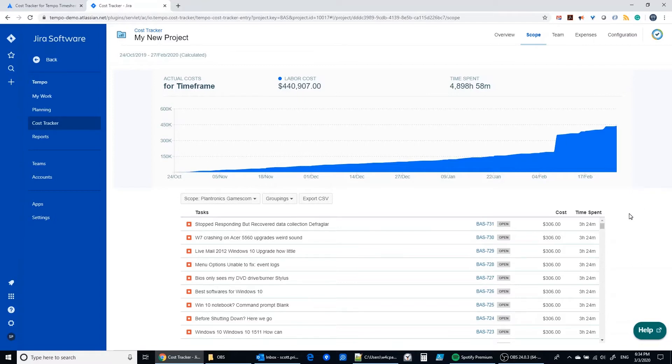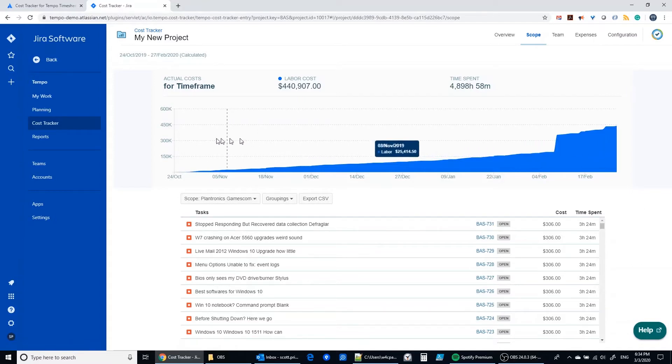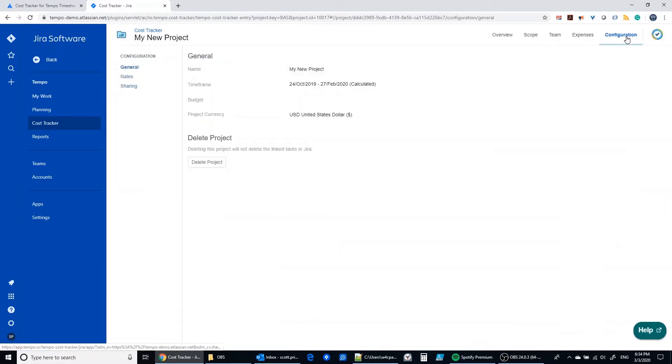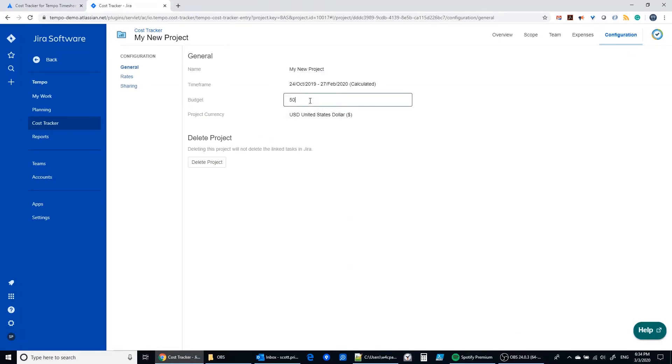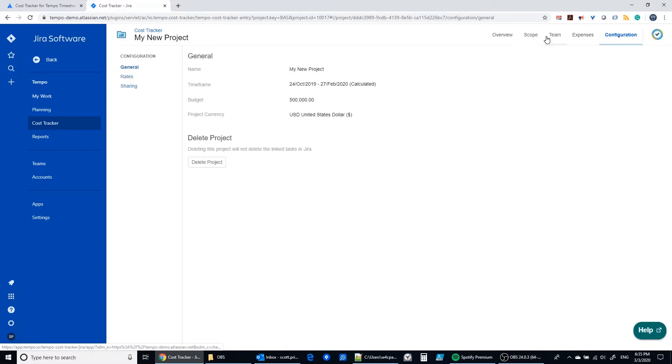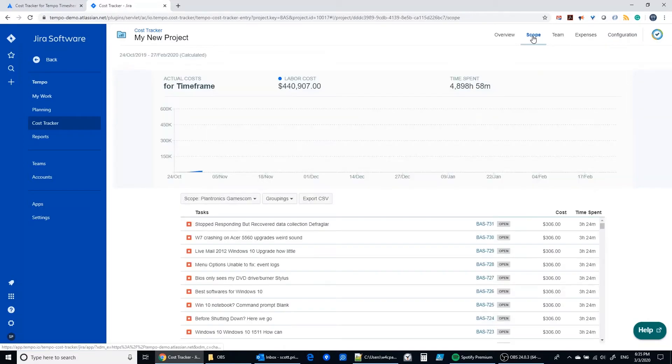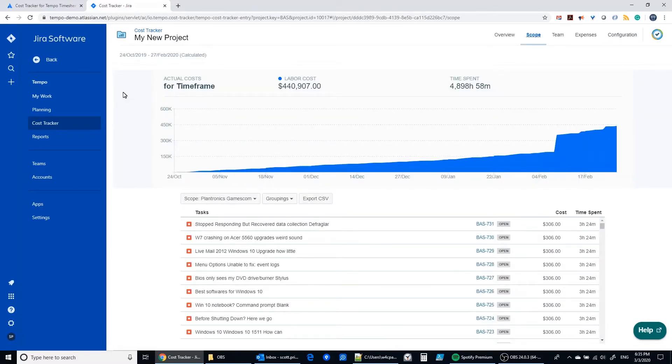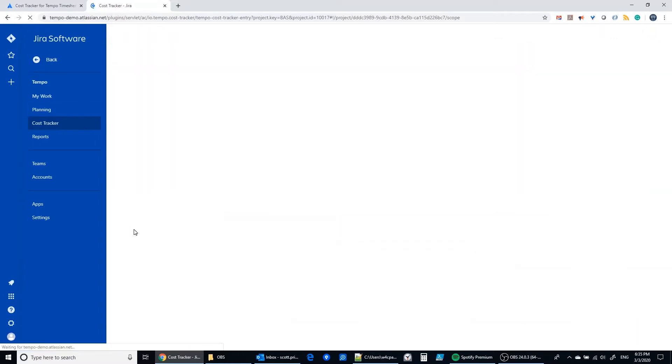Let's take a look at the configuration for a moment because what we're not seeing right now is a budget line. So let's establish a budget for this project in the configuration area. We can establish a budget. Let's say we've got a $500,000 budget for this in U.S. dollars and we can go back to that scope section and we should see a budget line show up.